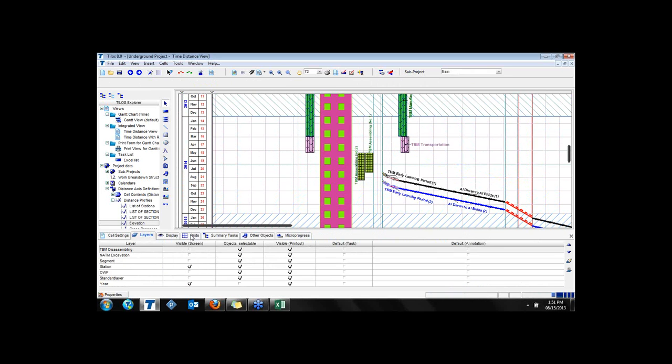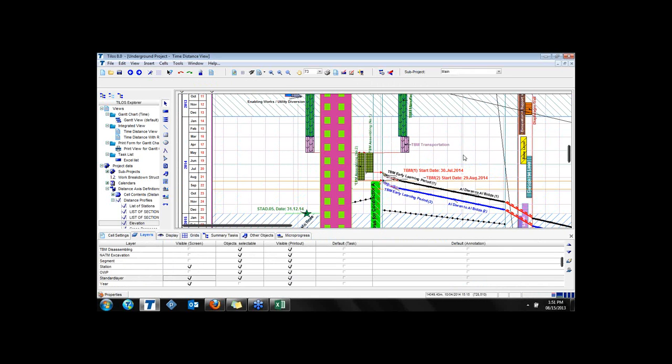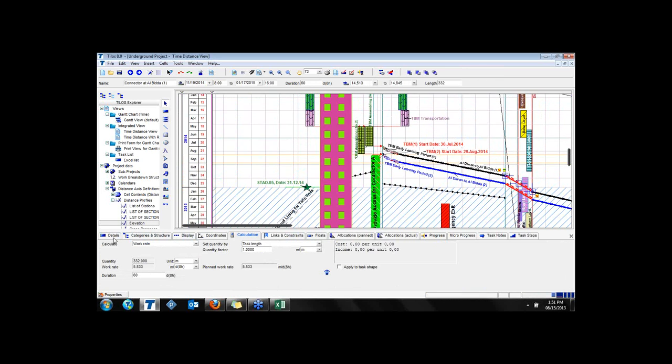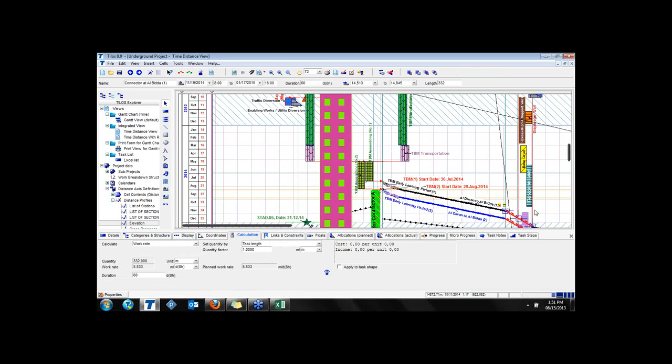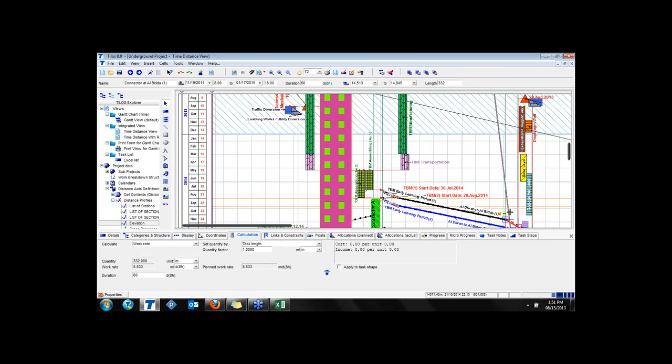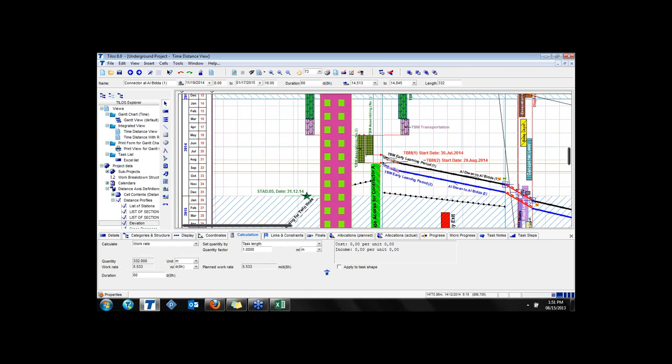And now let's see station works. Please see that the TBM is working here, and in the station you have your connector which you need to move the TBM here, and you need to finish your station works till that day. So here the aim is just to have the contractor's structure here, and you need to complete your excavation works, base level works, concourse level, and after that the TBM will be reaching the area and there will not be delay.